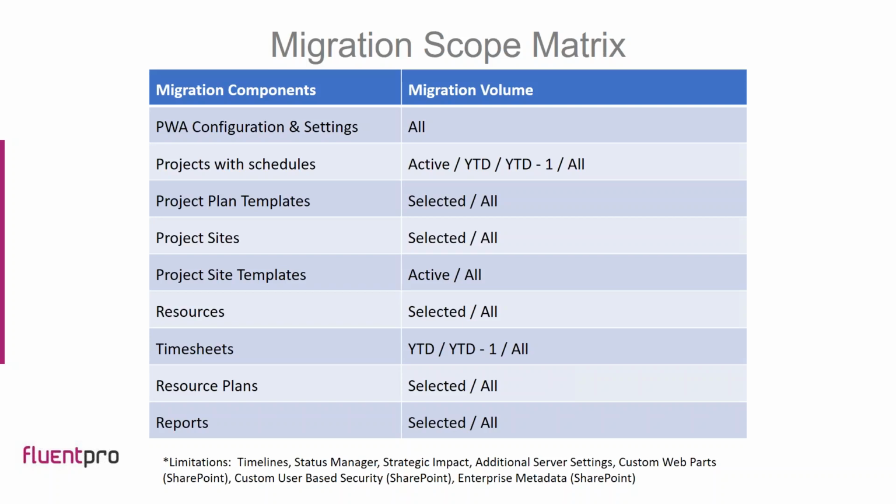This includes custom fields and lookup tables, enterprise calendars, resources, views, enterprise project types, PDPs. It would be a good practice to migrate them all to the target environment, because if any of the entities are missing, this could have influence on project's migration.